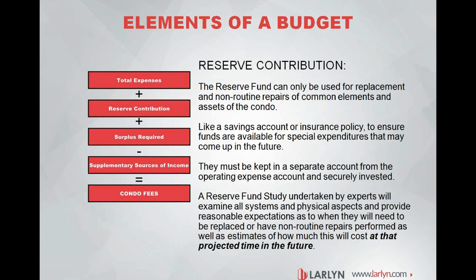The reserve fund study undertaken by experts, whether that be an architect, an engineer, or a reserve fund planner, will examine all systems and physical aspects of the corporation and provide reasonable expectations as to when they will need to be replaced or have non-routine repairs performed, as well as estimates on how much this will cost at that projected time in the future.